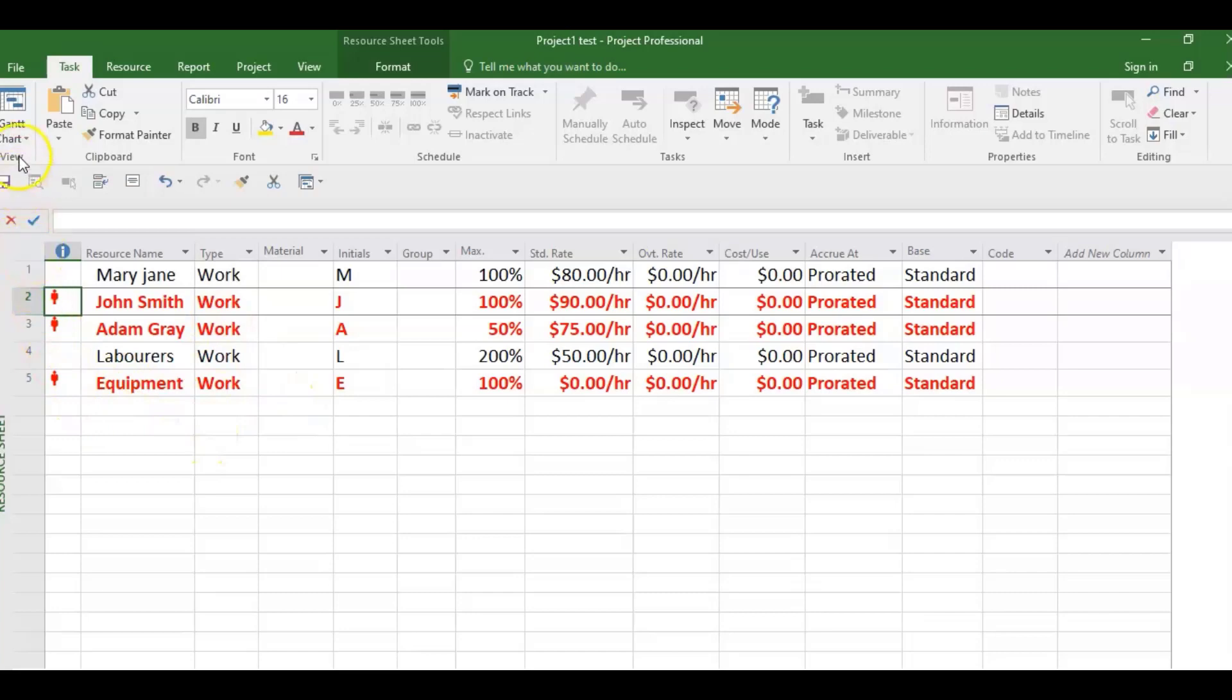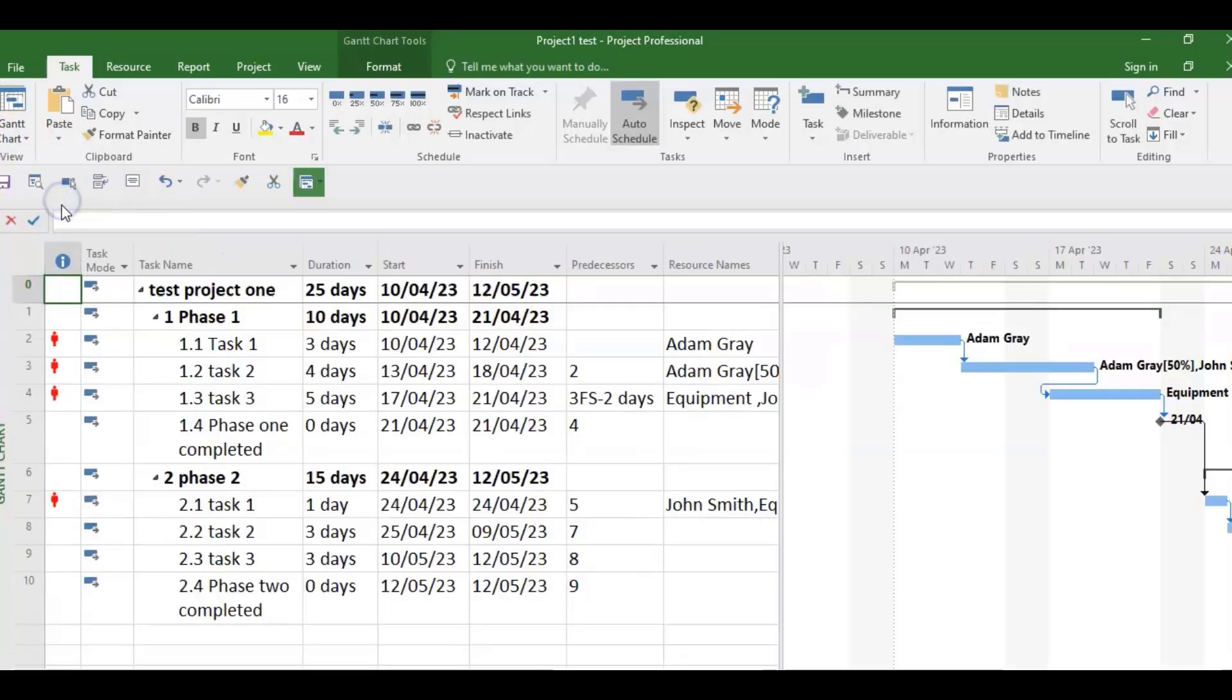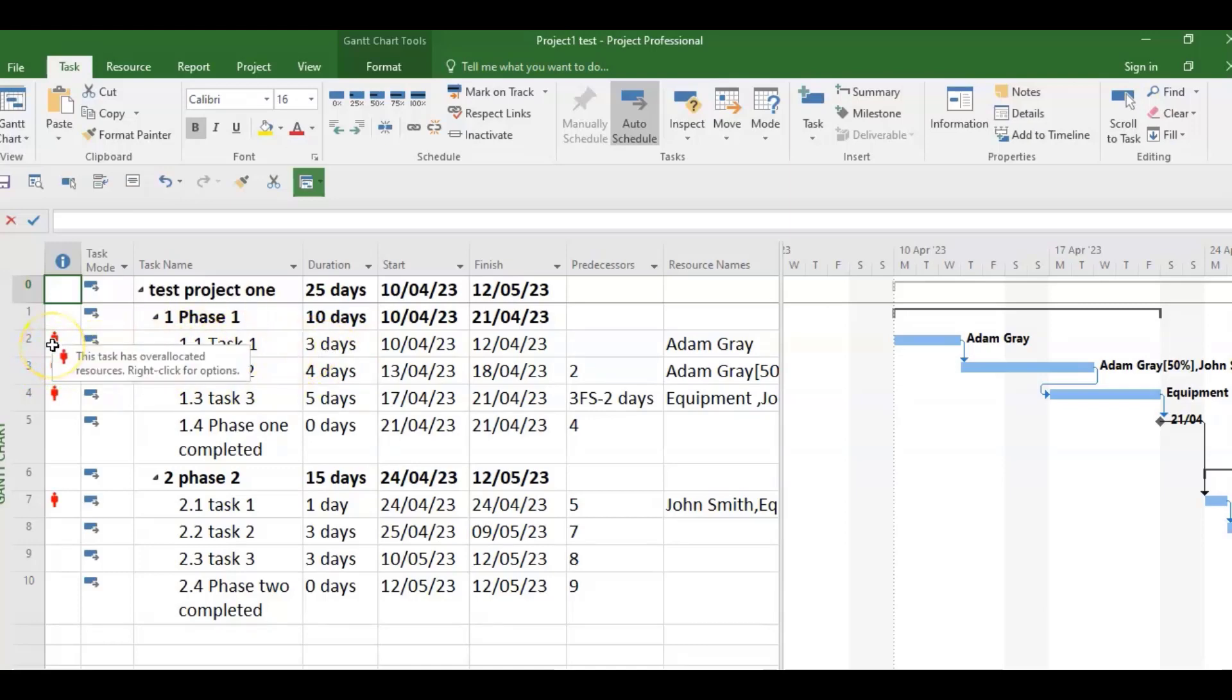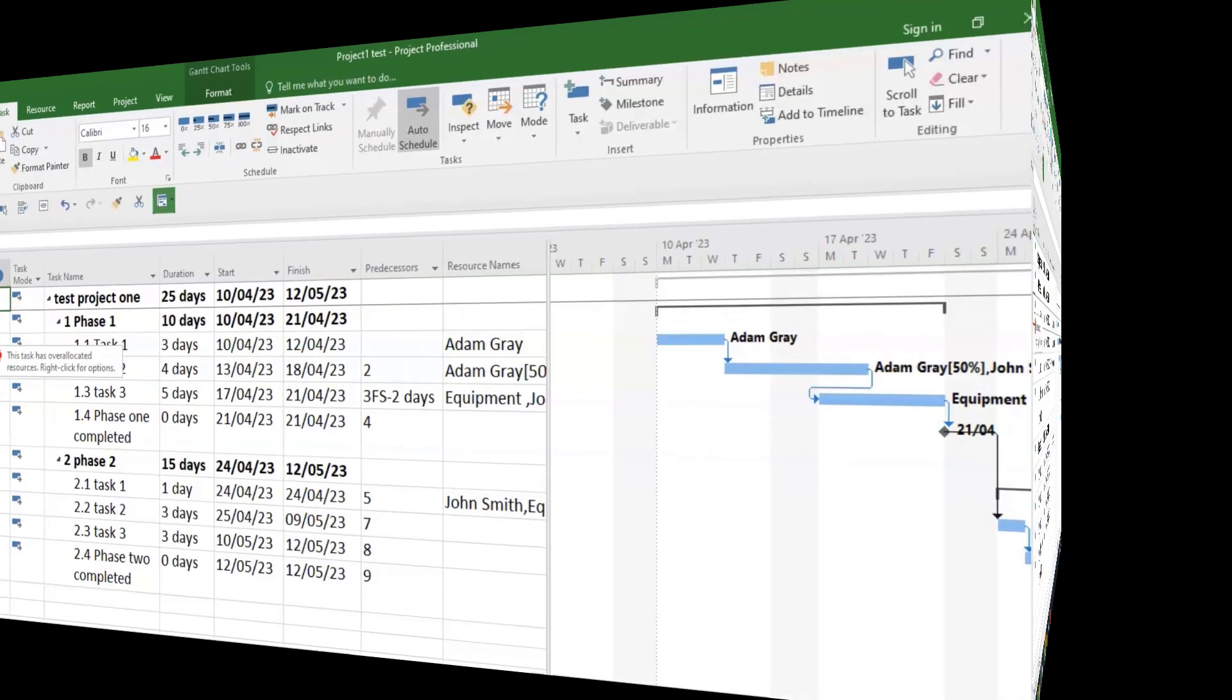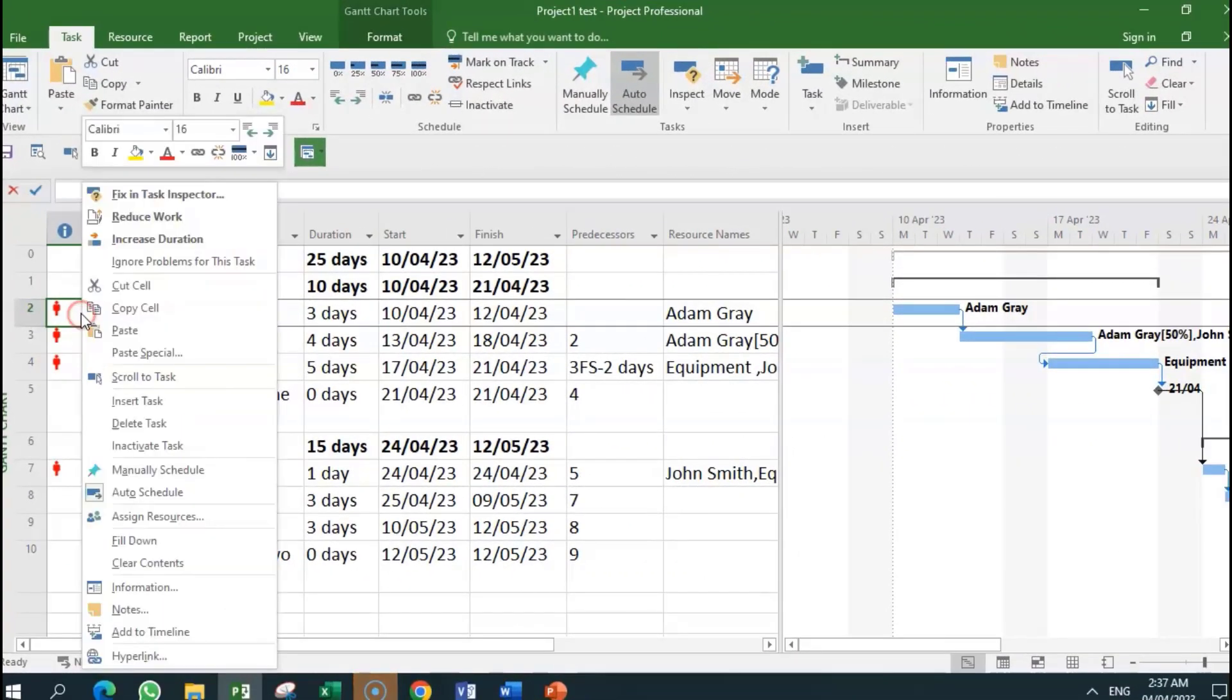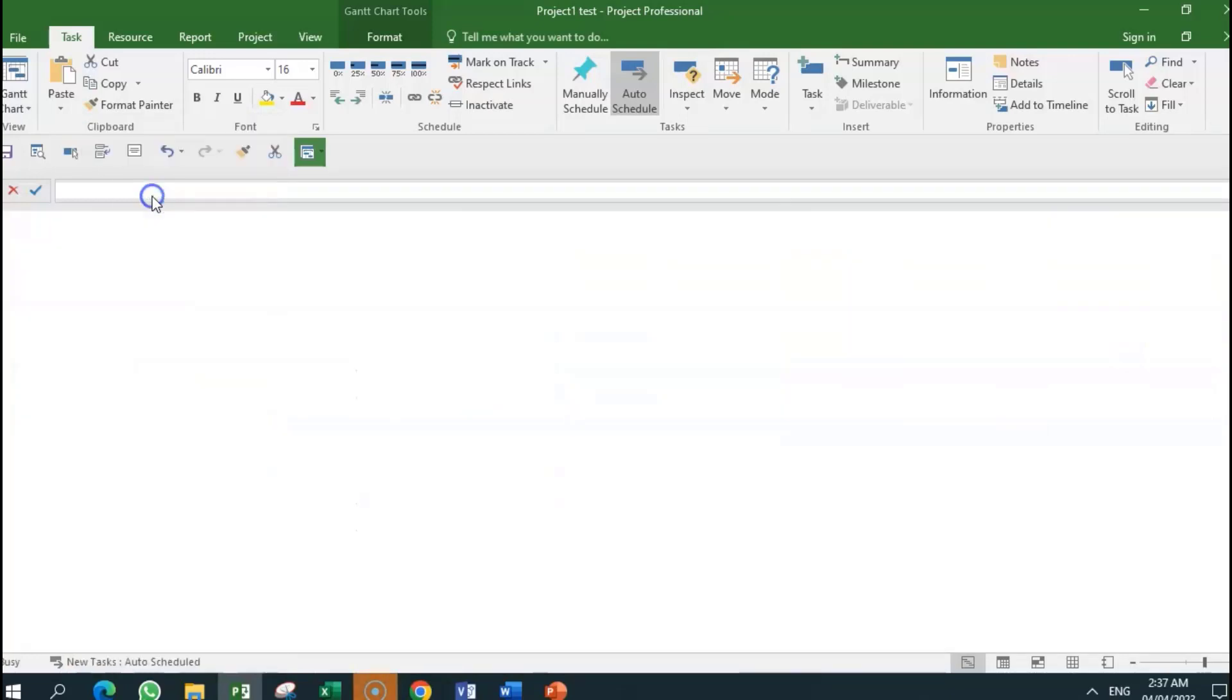The resource sheet view just says these resources are over-allocated. But before we can move, we need more information. So we're going to go to the Gantt chart view. The Gantt chart view shows what tasks are over-allocated. So you get that task one has an over-allocation problem. This task has over-allocated resources. Right click for options. So let us right click and go into 'Fix in Task Inspector.'